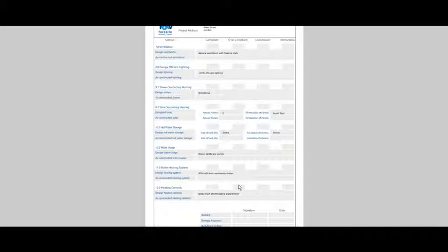The fixed building compliance documents cannot be signed off by the builder until the fixed building specifications have been commissioned and the homeowner has been instructed in how the appliances work. Only when this has been done can the commission and instruct boxes be ticked.